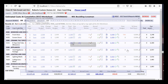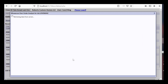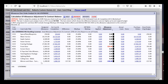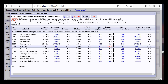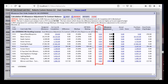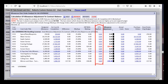Looking at the contract price summary in ECC Tools, you can see: the fixed price plus the change order price charged to the customer, plus the allowance adjustment — which you can drill into for a breakdown. The allowance adjustment affects the revised contract price, and our estimated profit variance has gone up a little because of what we're charging for the allowance overage on the front door.